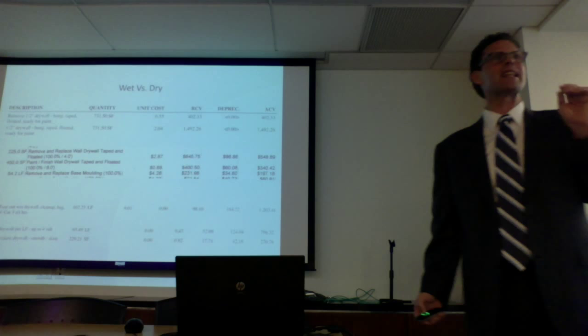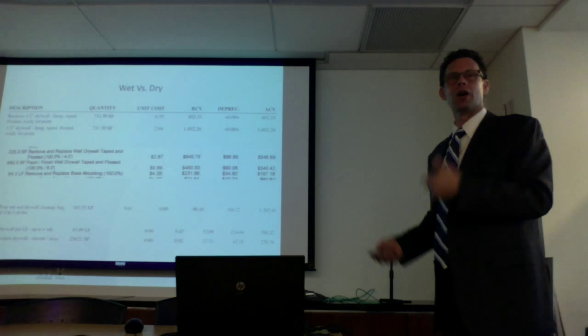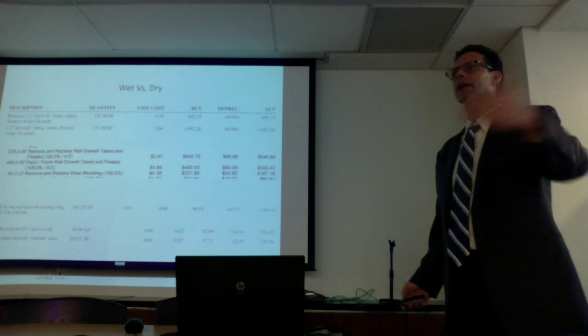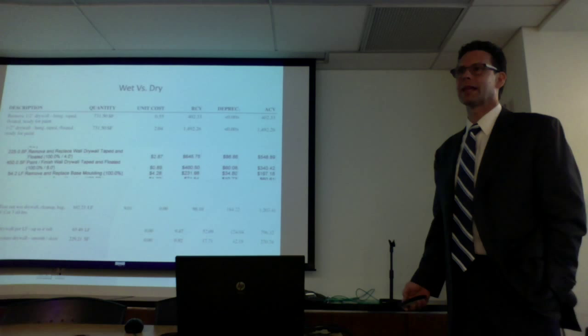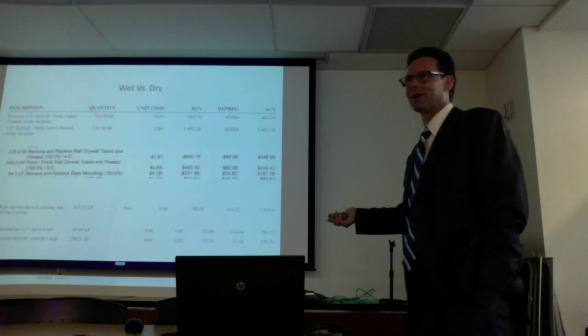Xactimate says in their description, this is assuming it's an in-stock item. You would need to consider how the drywall is getting there and put in for those items. When I talk to Xactware pricing guys, they tell me, well, just use labor and calculate the distance or fuel for the truck or labor for your time that's there for them to load it in. Xactimate is telling you what to use. So this price, which is triple what's in your estimates that everybody got paid on Sandy, is still a low number. And on top of that, it's a factored number, a repressed number.